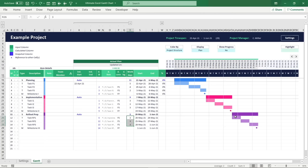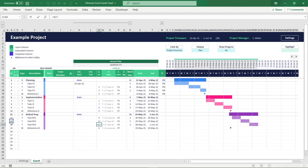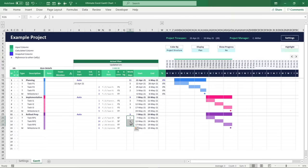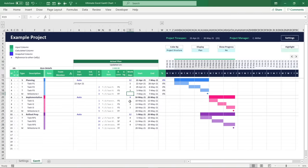To flip this into a backward-scheduled stage dependency with the stage end date tied to the preceding stage, you can simply reverse the dependency logic by rearranging the linked IDs via drag and drop, and updating the dependency connection types in the drop-down selections. Now the more the number of workdays is increased, the earlier the stage has to start. This dependency engine enables you to quickly set up and modify a fully dynamic project schedule, ensuring a change anywhere instantly updates all dependent items.